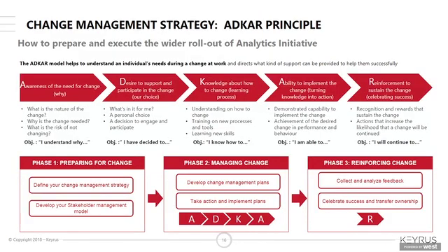One strategy, a change management strategy we implement, is called the ADKAR principle. Build awareness, build desire, create knowledge about the change, implement the change, and reinforce the sustained learning. And this sounds very high level, but underneath this, we actually have a framework right down to almost the schedule of roles and emails that have to go out, of communication that has to happen, because as Melissa said, the organizations that will win in this race are the ones that will have this ability to do the cross-functional, cross-business domain analysis, and communication will be key for that.